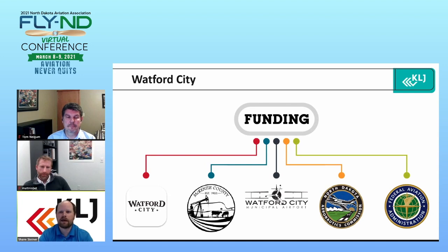As Matt went over, a number of studies popped up that wouldn't have been able to be funded through the FAA, or we would have had to wait till the next grant cycle. So for Kyle and his staff to jump in and say, yeah, we can fund a portion of that study in order to keep this thing moving was huge. And in my opinion, that's really what made the project get to where we're at today.